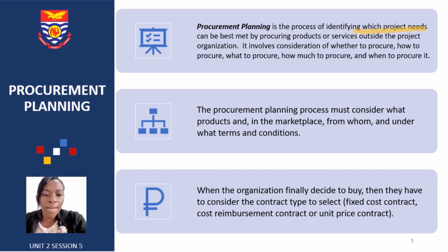Do we need just one laptop or do we need 2 or 3 laptops? And even that, we need to ask ourselves, what's our cost budget as well? And then we need to know when to procure it. Are you going to buy the laptop at the tail end of the project because the project manager wants to keep the laptop, or are we going to buy it from the start when we really need it for the planning process and even in the execution phase as well?